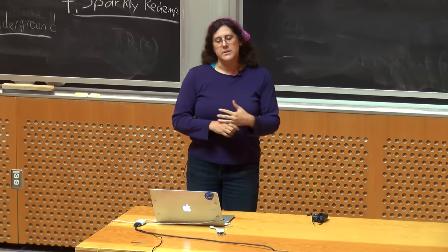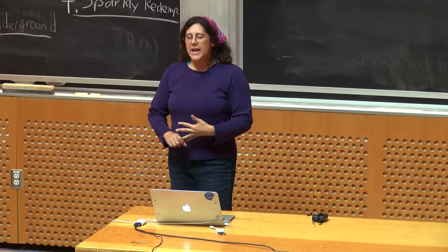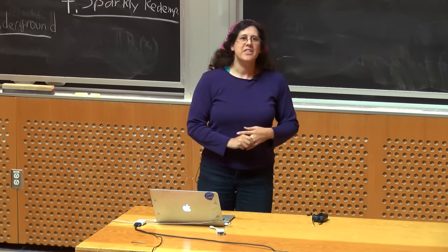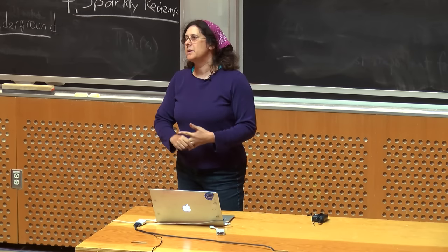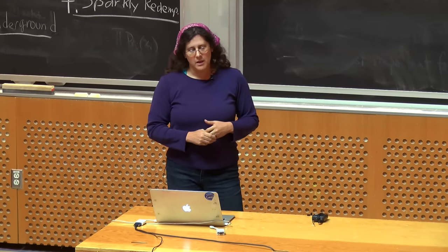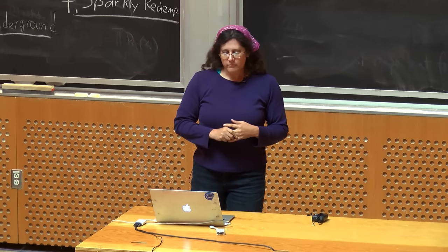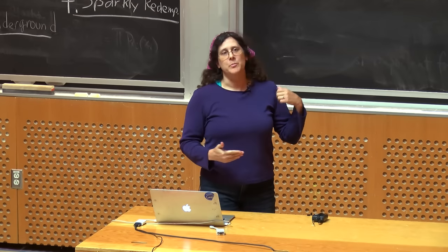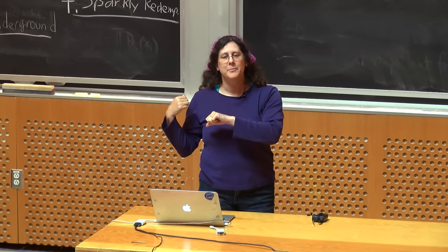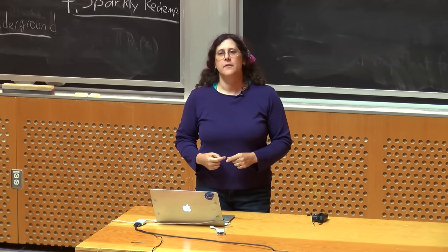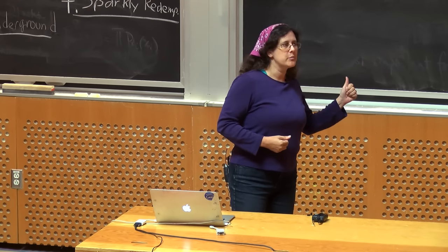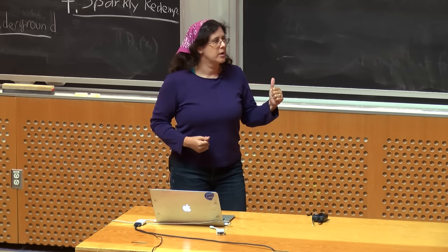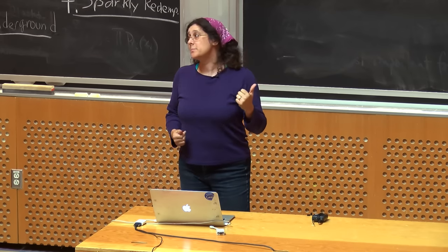Ideally, it recognizes the things that went right, the things that went wrong, and generates a short list, at least one or two items, of things to do differently next time because they will improve the things that happened. So it's a forward-looking meeting despite its name. Its name is retrospective. It's looking back at what happened in the past to see what you can do better in the future. If you do your team retrospective well, it actually will be a lot of what we're asking for in our postmortem write-ups.